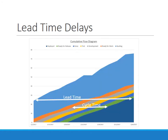What we're looking at here is a cumulative flow diagram. Without getting into too much detail, it's simply a snapshot of time of how many items are in each workflow phase at any given time, and then you flow that out into a graph. When we talk about delivering software early and often, there are two key indicators: lead time and cycle time. Lead time is the entire period from when an item first hits the backlog until it gets to production. Cycle time is the more nuts and bolts — when the team first grabs the item to start working on it until it gets to deployment and production.